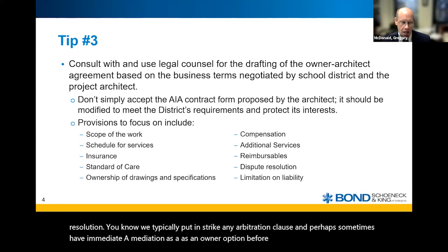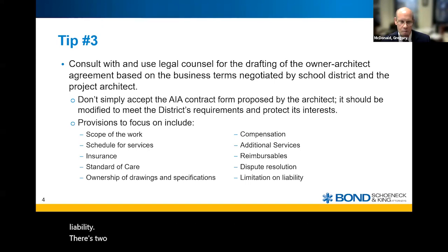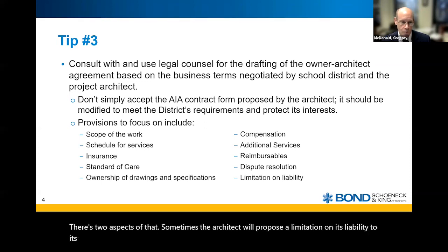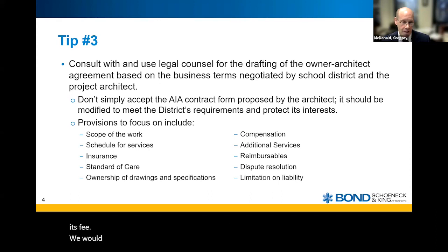And then limitation on liability. There are two aspects of that. Sometimes the architect will propose a limitation on its liability to its fee. We would uniformly strike that provision. And then there's a waiver of consequential damages. It's in the base agreement.